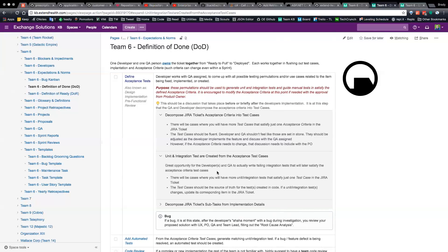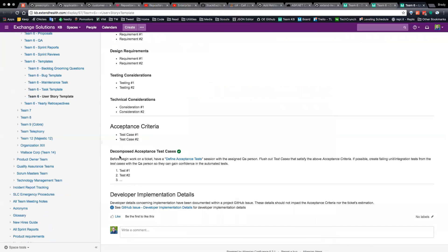I'd echo exactly what Brady said — if there are no integration tests and you're stubbing, that's important to know because that's a risk. The integration is the risk, so it's awesome to identify that. When you're looking at the acceptance criteria in the ticket and talking it out with the QA, writing down the test cases — identify which ones still need manual testing. It doesn't mean QA can't manually test one of the items; it's up to them what they'll manually test, but at least identify together which ones could be cleared by automation.